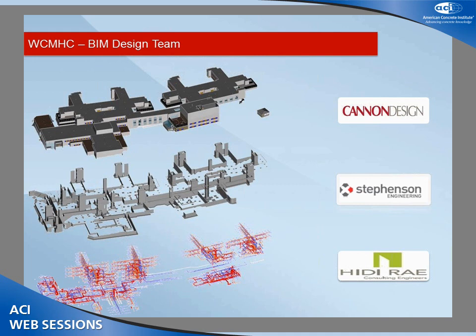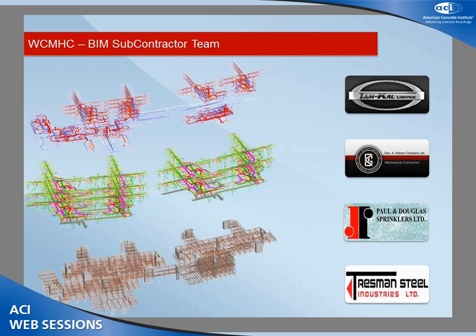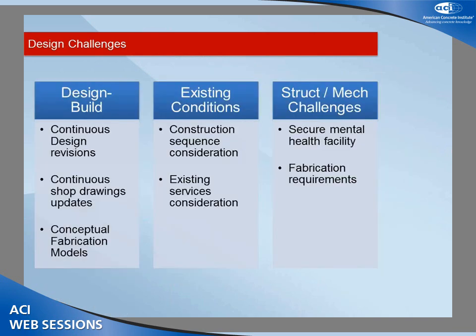Some of the companies involved with the project: Cannon Design developed all the architectural systems and content. Stevenson Engineering did the structural content and Edie Ray did the mechanical — each produced models at the design stage illustrating design intent, constantly updated through the design process. Once those systems got locked down, the subcontractors started developing their content. Temcal did all the sheet metal and ductwork; Kelsey Mechanical did all the piping; Paul and Douglas did their sprinklers in 3D; and Trustman did the structural steel. For the most part, all design-stage content was produced in Revit, but when moving into construction each subcontractor works in a different software. The challenge is getting all these software systems to talk to each other, so we need to set up an execution plan early and make sure everyone plays nice together in 3D.